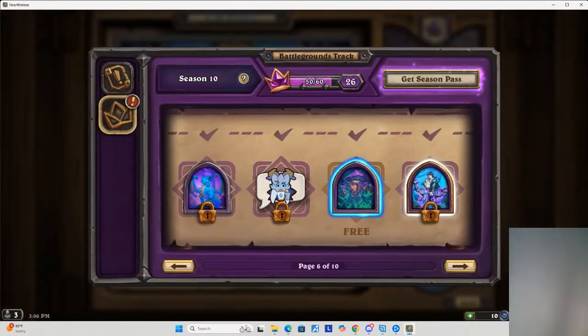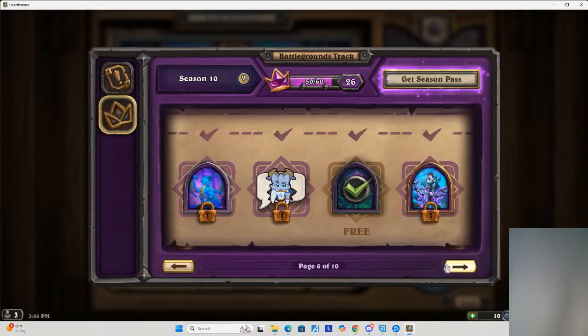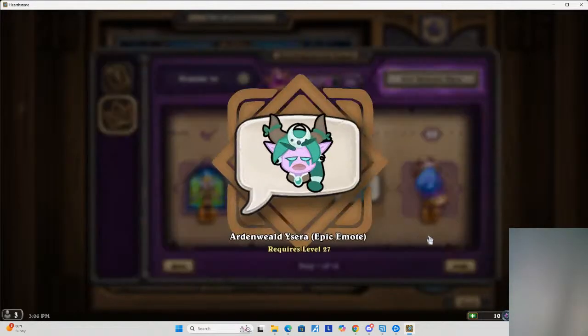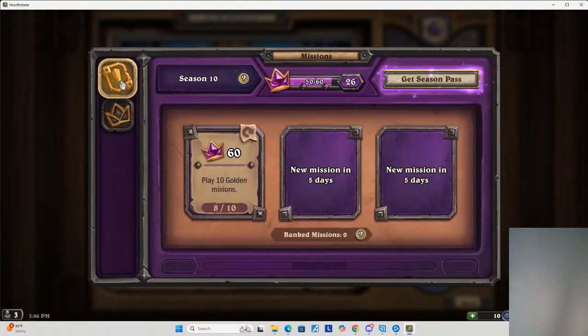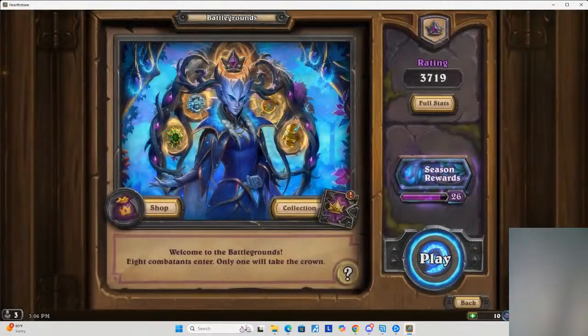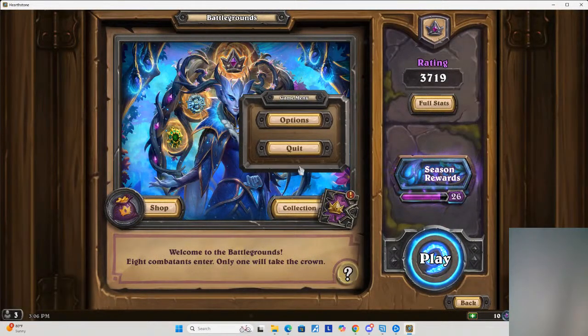As shown in the assignments from the sample project, which you can find in the exercise files, the business owner is the only one who can sign contracts, commit to the budget, and approve the completed work. You can also add who needs to know about tasks so you can keep them informed. For example, the employees and clients need to know when the new office space will open. If your project is large,